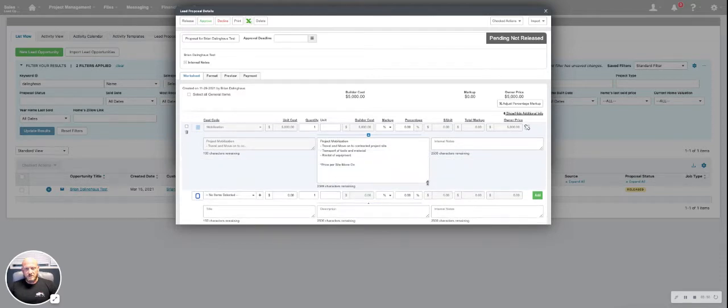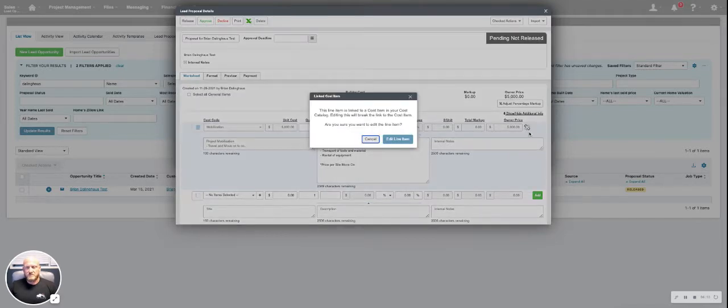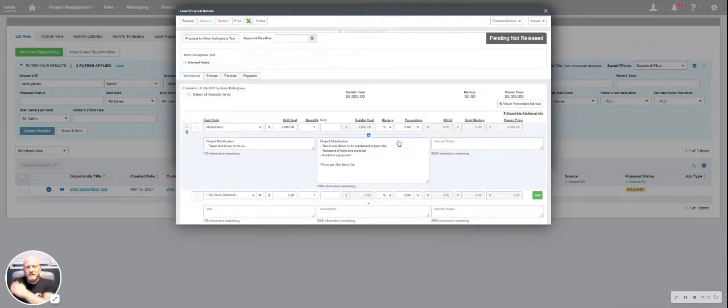You can grab this and drop it down into that spot, as well as the costs associated with it and everything like that. But now let's say for this project, we're only going to go out roughly 2 days to do this project. We really don't need a $5,000 mobilization. Let's say we're going to do $1,000, $500 a day, $1,000. So we're going to come in here and you can select this little paper clip and go edit line item.